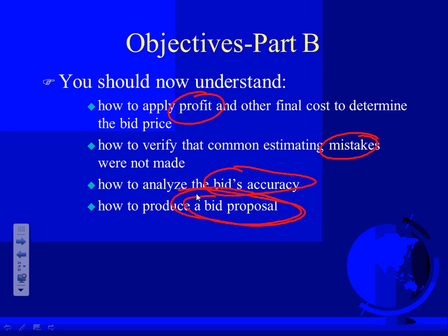For the takeoff from AccuBid, from McCormick, I want to give you wheels and counters, and you will be doing the takeoff. I would like you also to mark them, guys. I would like you to mark how you draw the conduits. We will be using MC cable and EMT conduit. So when you take off, you're going to be using MC cable, and EMT conduit. For the home runs, we're going to use EMT conduits for the commercial project.